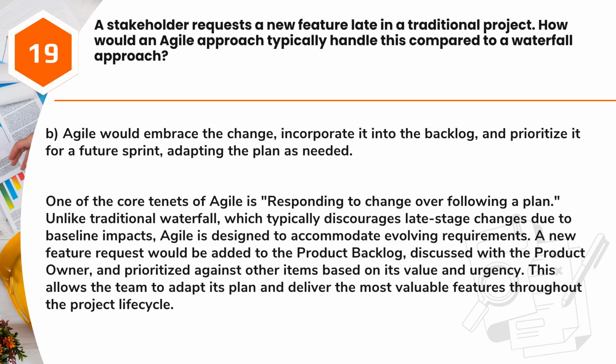Answer: B. Agile would embrace the change, incorporate it into the backlog, and prioritize it for a future sprint, adapting the plan as needed. One of the core tenets of Agile is responding to change over following a plan. Unlike traditional waterfall, which typically discourages late-stage changes due to baseline impacts, Agile is designed to accommodate evolving requirements. A new feature request would be added to the product backlog, discussed with the product owner, and prioritized against other items based on its value and urgency. This allows the team to adapt its plan and deliver the most valuable features throughout the project lifecycle.